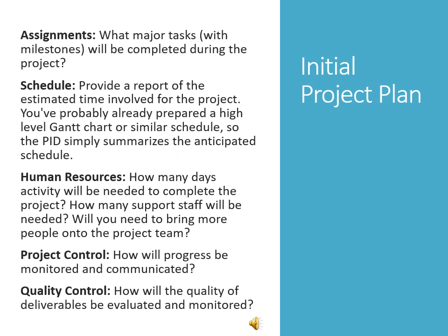The initial project plan: we need to initiate and start with a project plan which includes the assignments, what major tasks with timeline or milestones will be completed during the project. The schedule: provide a report of your estimated time involved for the project. You have probably already prepared a high-level Gantt chart or similar schedule, so that your project initiation development plan simply summarizes the anticipated schedule.